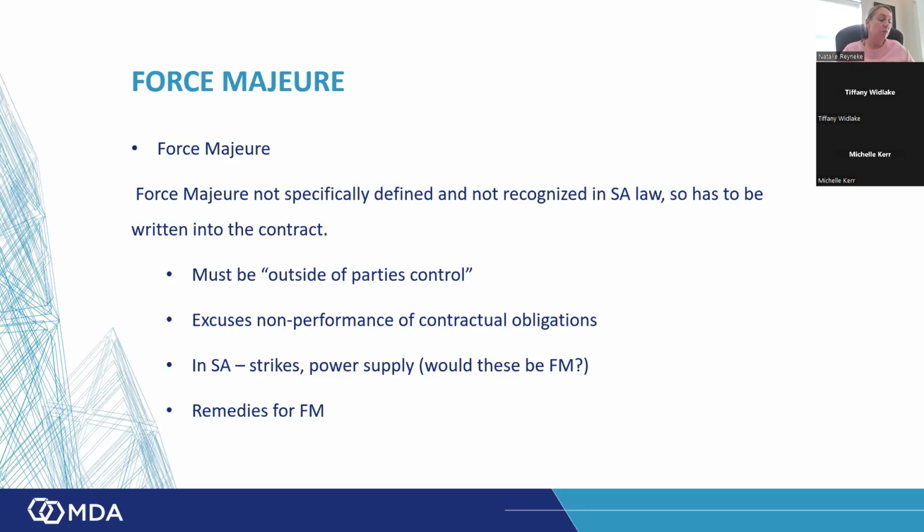So the issues with COVID that arose was that, I think the first impacts that we started having from that was when, as South Africa, we couldn't receive goods because of the shutdowns in China and things like that. The shutdowns hadn't come to us yet. So there would be an issue with not being able to receive or procure items that would be delayed in the ports or in the factories or whatever it was. So that was the first instance of the force majeure that we felt in South Africa.